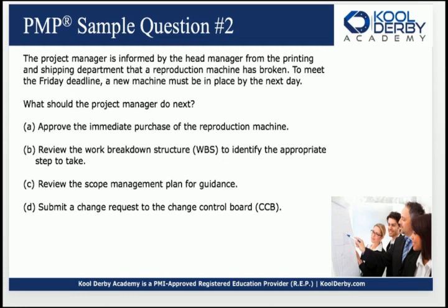Yes, it could take longer than you just saying yes or no, but if you have it set up correctly, this board can make a pretty quick decision. And if you have that in your scope management plan, they might even be able to make the decision that afternoon and give you an answer, especially if something is urgent. There should be an escalation process included in the scope management plan that helps you make the appropriate decision.